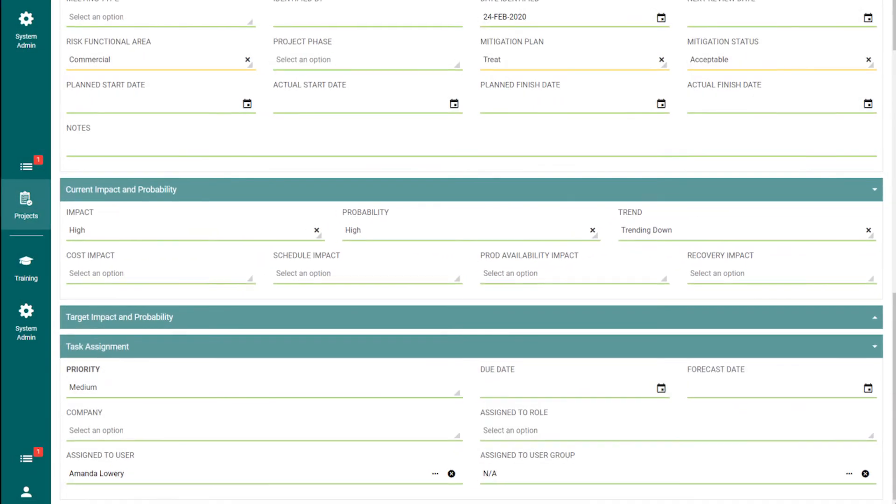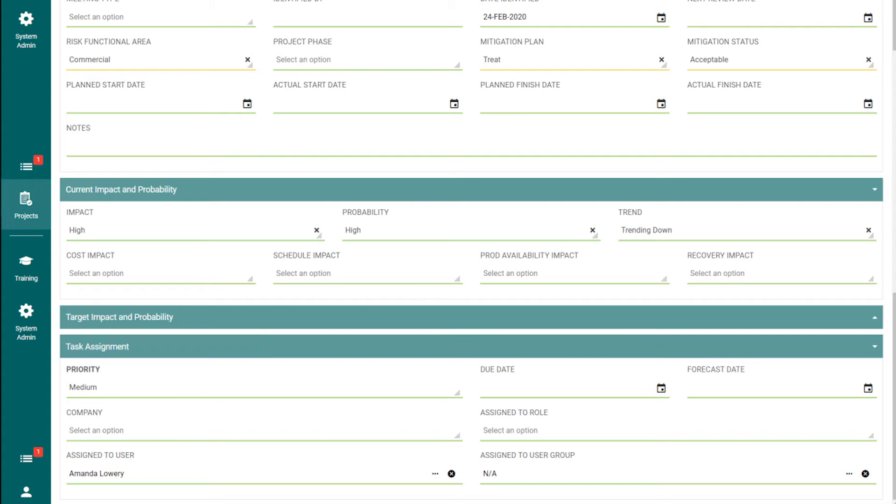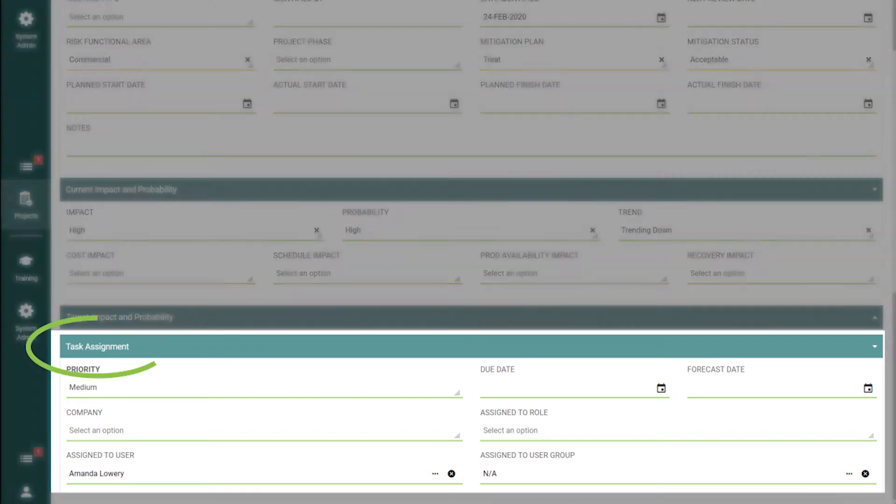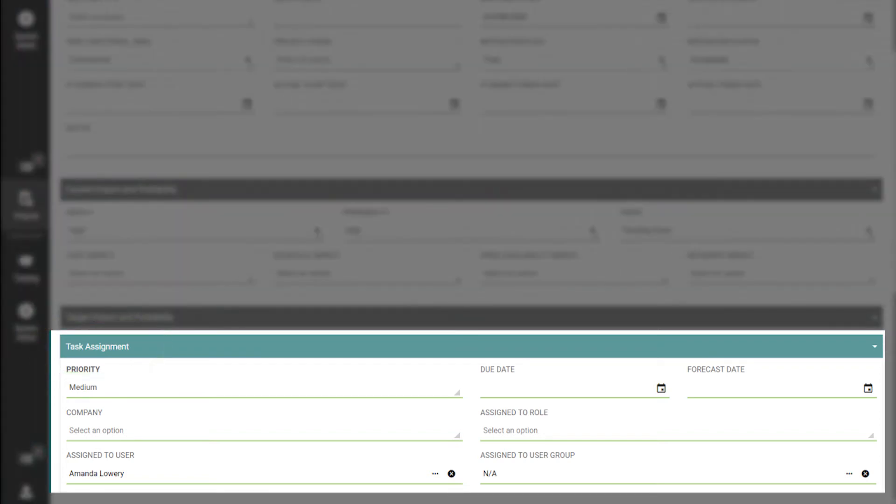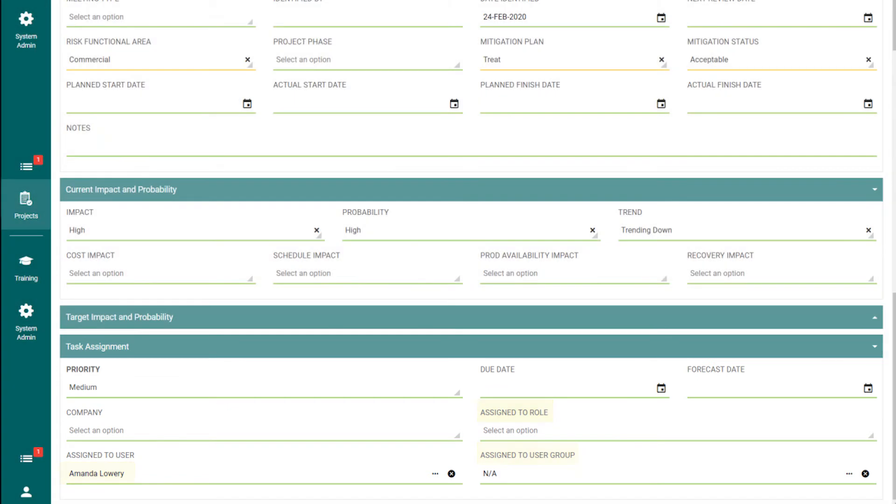If this risk had target impacts and probability, these would be recorded in the target impact and probability section using the same scale of very low to very high. And finally, after all this talk about the potential risk, someone has to take ownership of it. The Task Assignment section is where a priority, a due date, and the responsible party will display. A responsible party can either be an individual user, or it can be assigned to a certain role or user group.